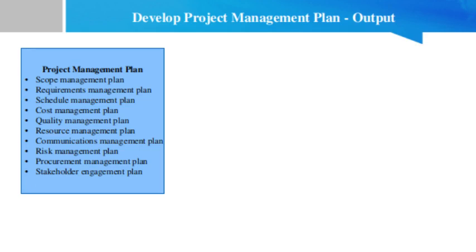Quality management plan establishes how an organization's quality policies, methodologies, and standards will be implemented in the project. Resource management plan provides guidance on how project resources should be categorized, allocated, managed, and released. Communication management plan establishes how, when, and by whom information about the project will be administered and disseminated. Risk management plan establishes how the risk management activities will be structured and performed.